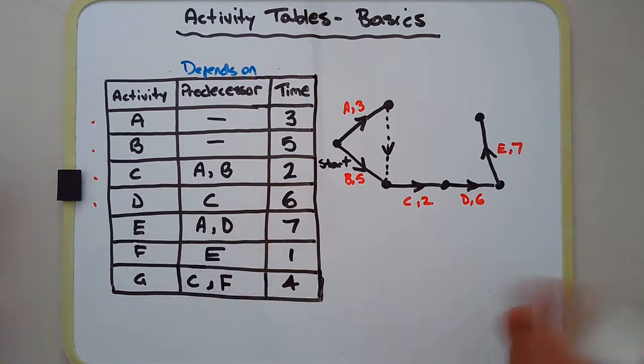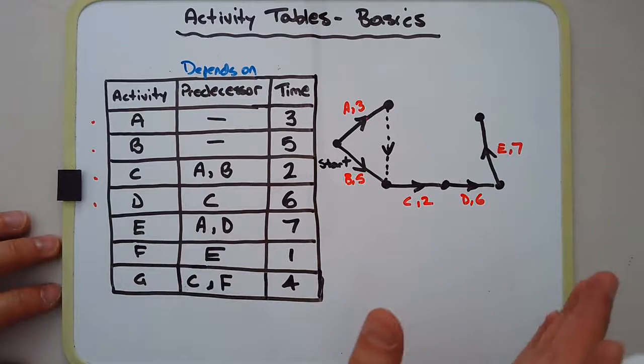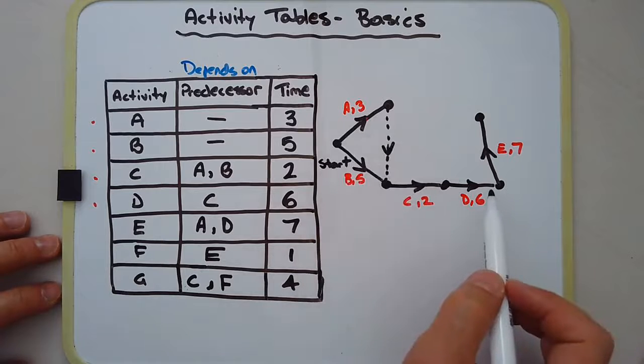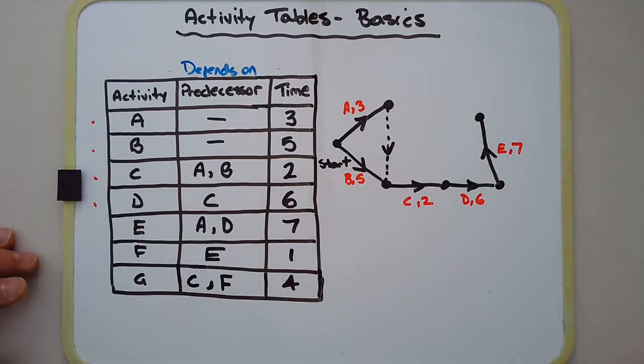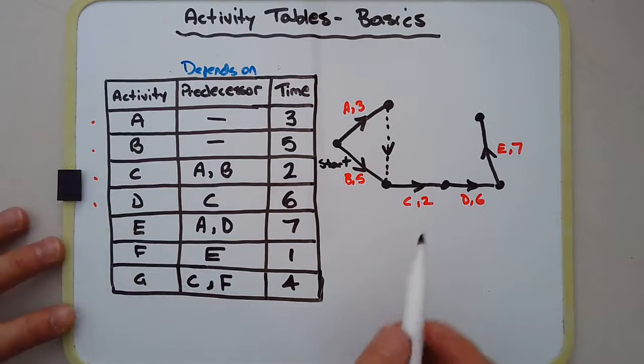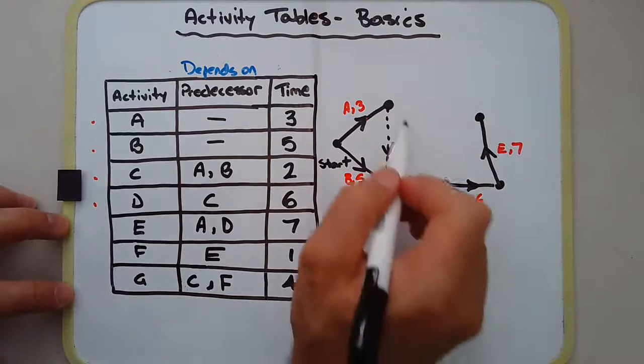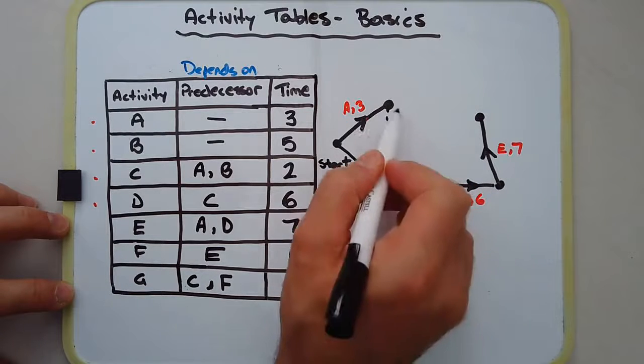Look, I would probably advise that you draw your diagram in pencil. It's possible to rub out an edge and redraw it somewhere else. But if need be, you can introduce another dummy activity, okay? It doesn't make it incorrect, it just means that the diagram possibly has more dummy activities than the minimum required. So I'm going to join A to this vertex here.